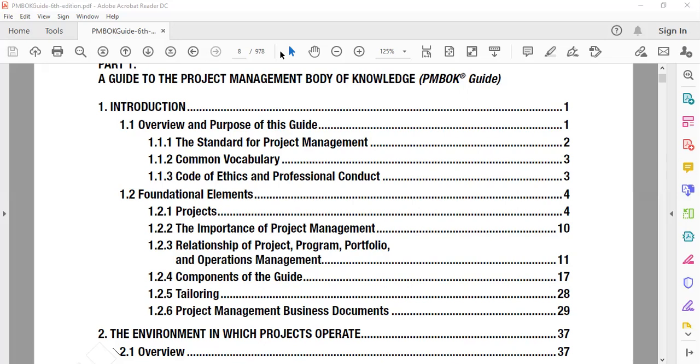To start a project, I need two main documents: the business case and the benefits management plan, which are actually pre-project activities and would be done by the business analyst. In the sixth edition, PMI has given us the leverage that the project manager, after the agreement is made, can be included while preparing the business case and benefits management plan in order to increase the business viability of the project.